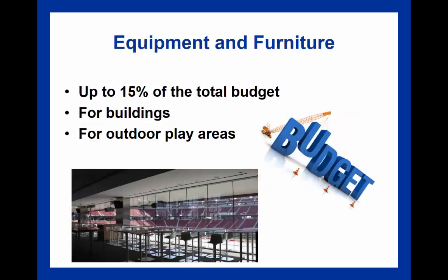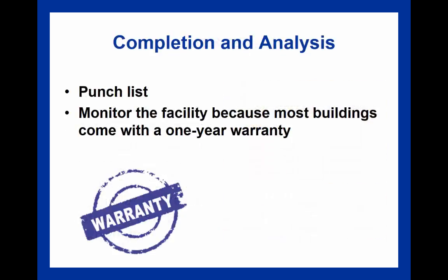Unexpected things do come up, and oftentimes these unexpected costs can create cost variables that can make your project even more expensive. Things like additional costs in transportation or errors, relocating and moving materials and expenses, and unanticipated environmental issues. These all can add to the cost of your facility. But once the facility is constructed and completed, that's where you'd have the completion of the project.